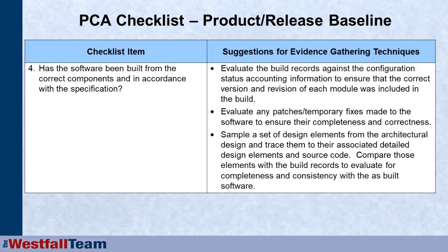One of the things I always do, if there's any kind of patches or temporary fixes, you need to make sure that those patches or temporary fixes were put in completely and correctly each time you rebuild the software. Typically, you only do these, especially if it's a released piece of software, because there's something critical that's happened in the field and you had to patch it or put a temporary fix in it for whatever reason to correct that critical problem in the field. It's so easy when you put a new patch in to a new build to either forget to put it in or put it in wrong.